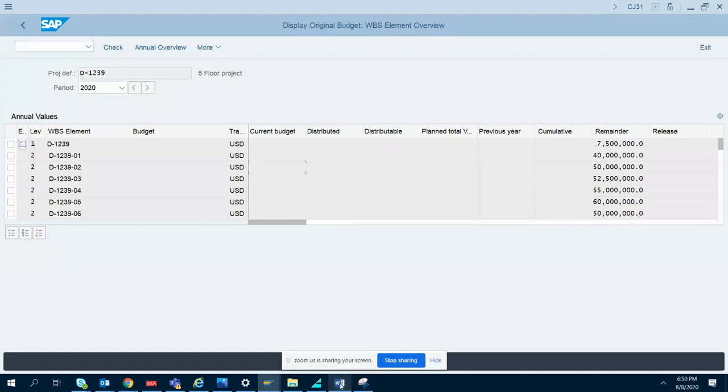No. You have only given one structure, saying first floor, second floor, third floor, fourth floor. That's it. You haven't given that the first floor is in 2020 to 21, and the fourth floor onwards is 21 to 22. You don't have dates itself at this point in time. You didn't mention the date control. Yeah, exactly. These date controls generally will come once you have the network in place.